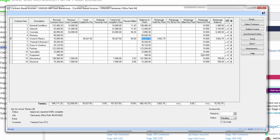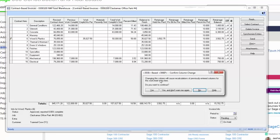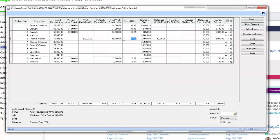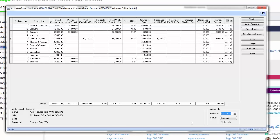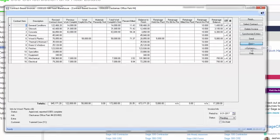So here I can either do 50% and then it calculates the amount for me, or I can put the amount here and it'll calculate the percentage for me. Notice how it's calculating the retainage held based on the information set up. Final step is to put the period through date on my invoice and then the last thing I need to do is print.